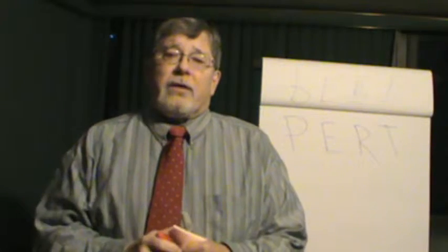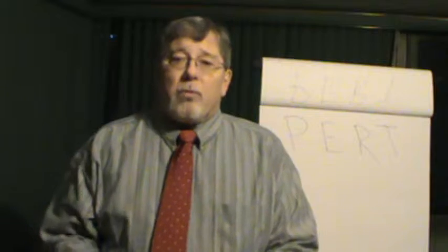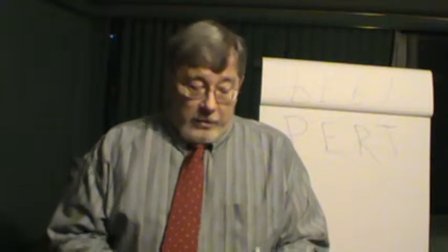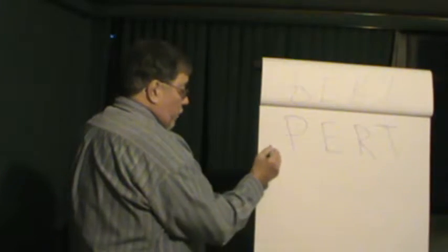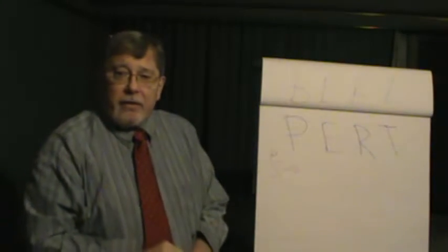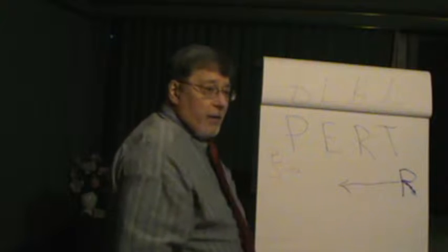What is important about this compared to normal project planning that everybody knows and loves is that, instead of starting here, where the project starts and works itself to the end, PERT starts at the end and works its way back with the question, what happened just before that?